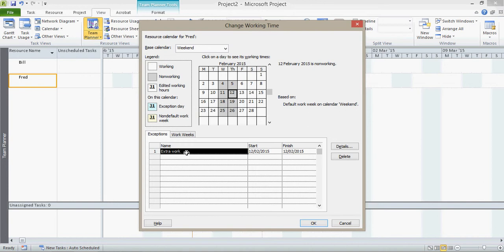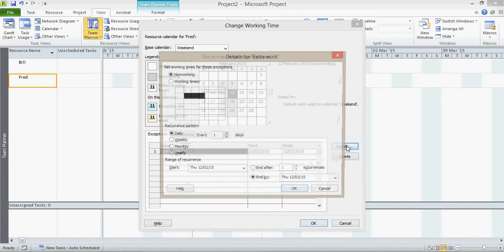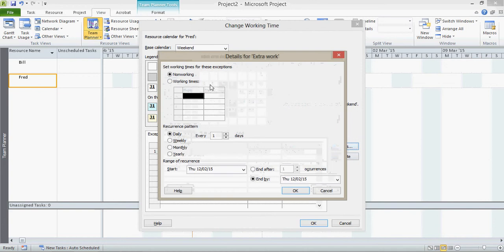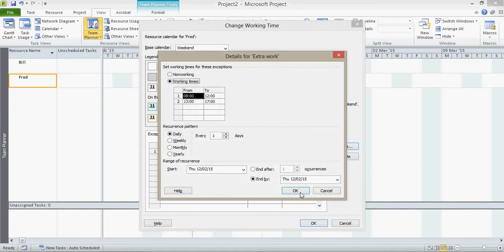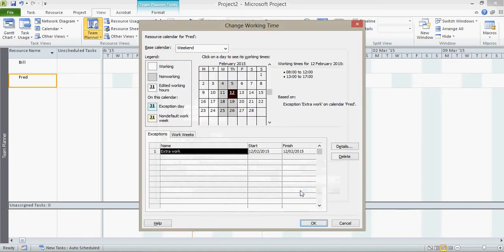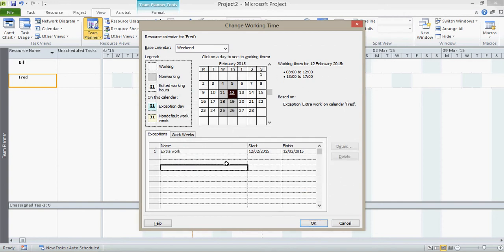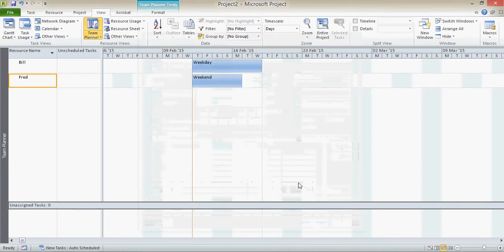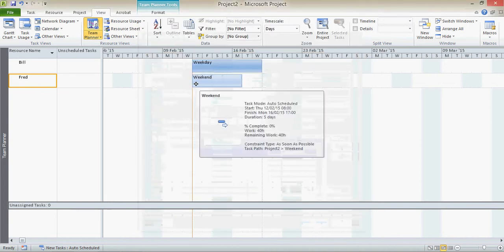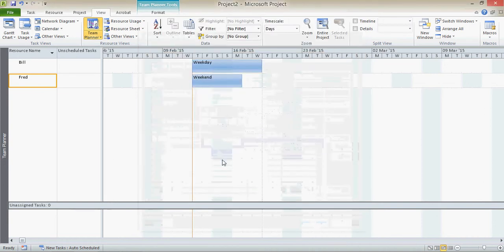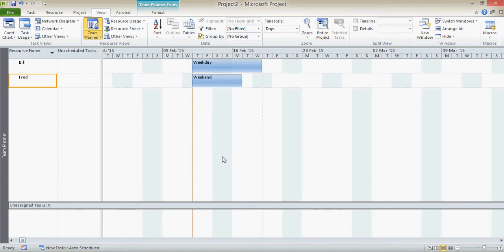However, I haven't defined the exception yet. What I now need to do, as you see here, it still says the 12th is non-working. Even though it's an exception, I need to go into the details and change that to have working times. Click OK. Now we see it has working times on that day and it's marked up as an exception. Click OK, click OK again. And hey presto, Fred's work now starts on the non-working day.